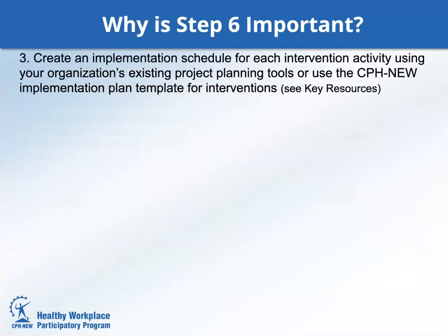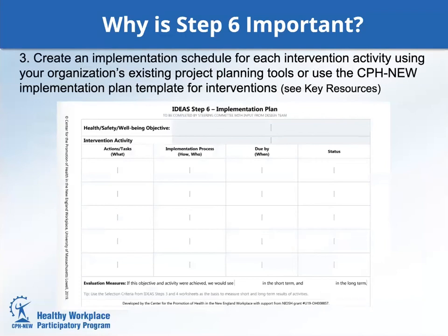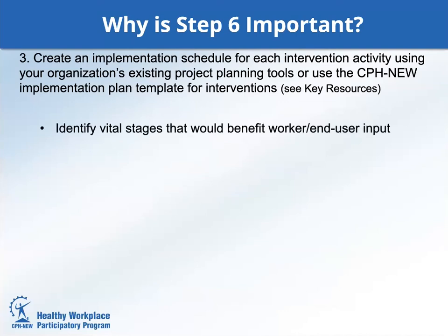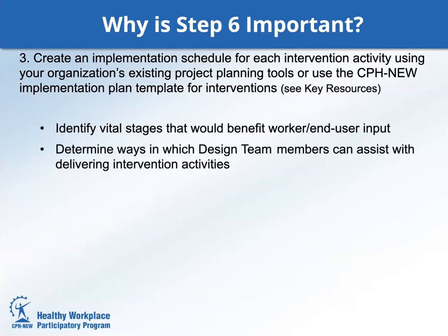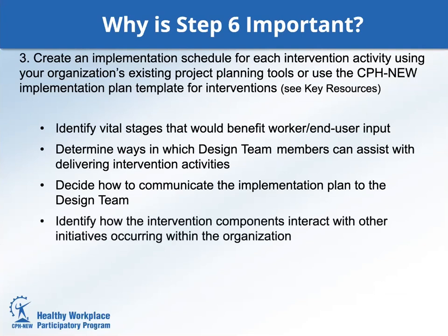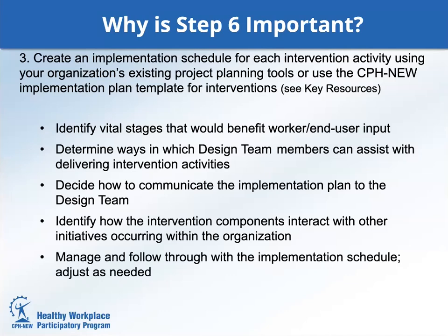Three: create an implementation schedule for each intervention activity using your organization's existing project planning tools, or use the CPH New implementation plan template for interventions. Identify vital stages that would benefit from worker or end user input. Determine ways in which design team members can assist with delivering some of the intervention activities. Decide how to communicate the implementation plan to the design team, as they serve as essential supporters and problem solvers and should remain well informed. Identify how intervention components interact with other initiatives occurring within the organization. Manage and follow through with the implementation schedule and adjust as needed.